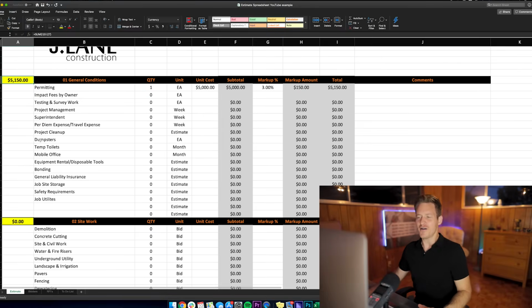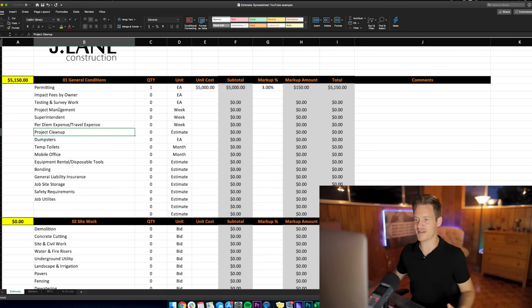Okay, so what general conditions is, this is not overhead. General conditions is things like permitting, dumpsters, mobile offices, temporary toilets, maybe some bonding, equipment rental, job site storage, safety requirements, job utilities, general liability, whatever you need. Project cleanup, superintendent, and project manager are your biggest general conditions.